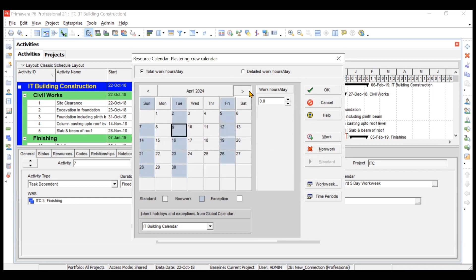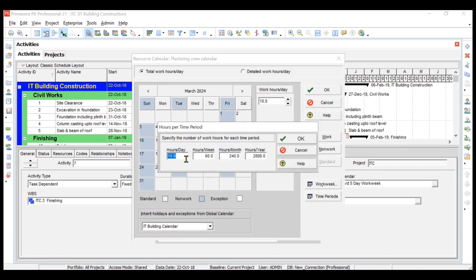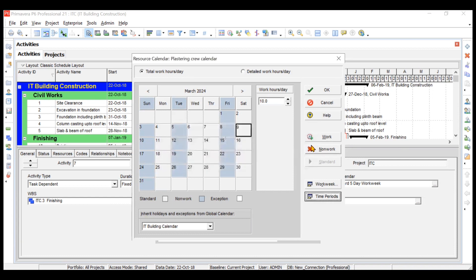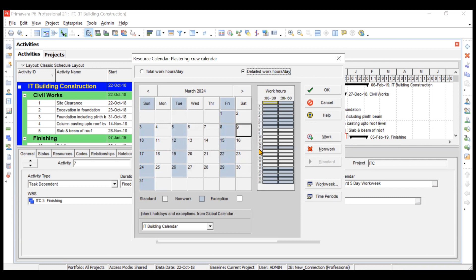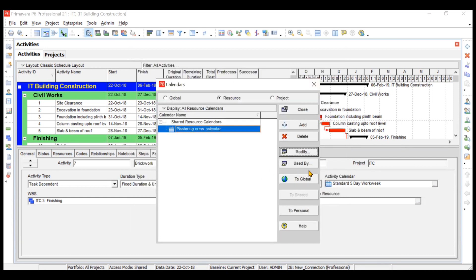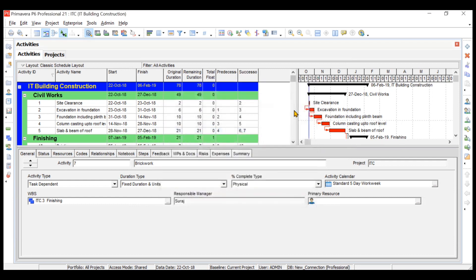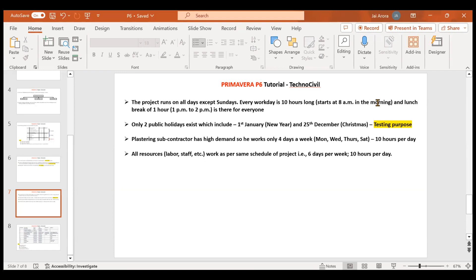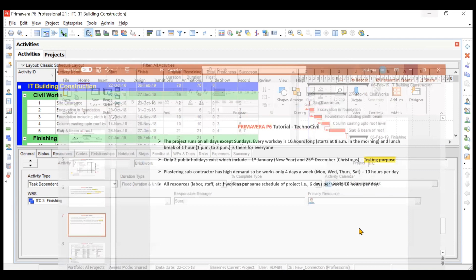Now Sunday, Tuesday, and Friday are off every week for the plastering crew. You also need to change the work hours in Time Periods. Since we based this on the IT Building Calendar, the detailed work hours are already correctly set. Click OK. This resource calendar will be assigned to the plastering crew when we create the resources in another video. Both calendars — one for the activity and one for the resource — have been created successfully. We'll assign them in the next video.